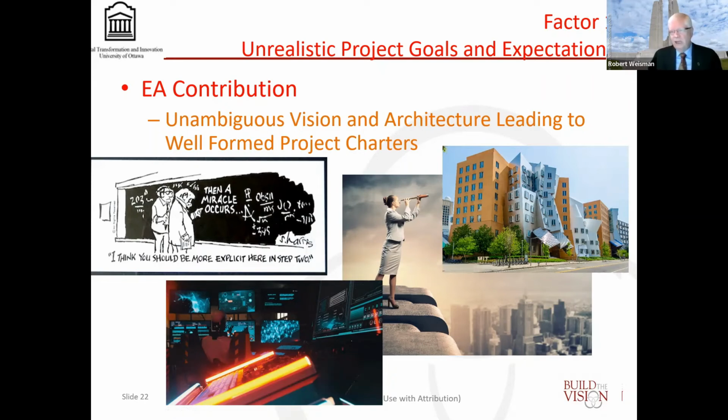Like in EA, they say before you go into detail, get approval for the high level overview. So don't go diving into details. From my management consulting days, well, I'm still doing management consulting, but it's different. One project spent all of their money doing business analysis. We're talking $100 million. You could have papered an entire building with all the BPMN maps and all that sort of stuff. They got nothing implemented.